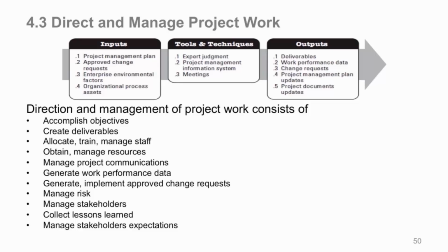Manage your project communications, very key. Keep everybody informed. If you keep them informed very well, you'll avoid problems downstream with deliverables you didn't expect, or you may even increase the level of change requests because of your communications, but that's a good thing because you'd rather know it now and address those changes early instead of addressing them later on where the cost of rework may be terrible. So, communicate well during your directing and managing the work.